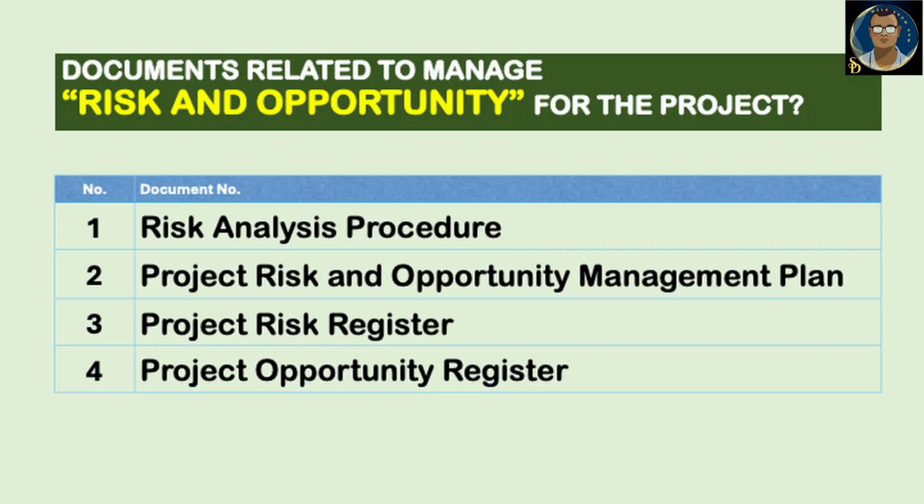So there are some documents we generally prepare for the project. From a live example, I can tell you for our project it is the risk analysis procedure, the project risk and opportunity management plan, and then there are 2 registers, one for the risk and another for the opportunity.